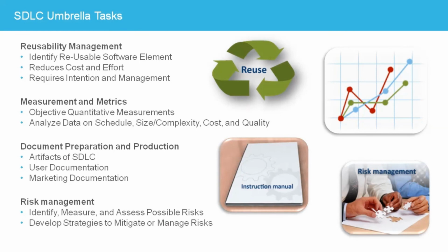Once the risk plan is established, it must be used to monitor the project data for the predetermined data thresholds. When the metric risk indicators pass the predetermined threshold, it triggers the project to invoke the strategies developed to handle the risk.